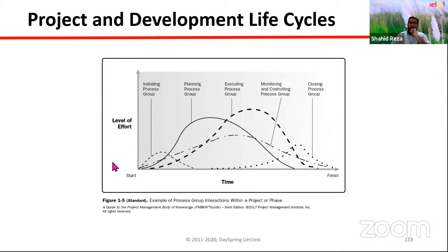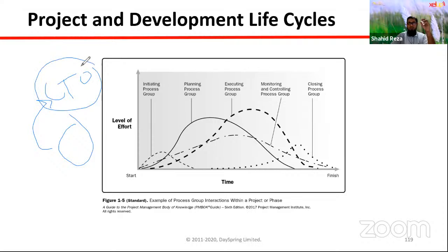So in a private sector organization, what happens? For example, the CTO at the top of the IT department. Any project running in the IT department, you will see everywhere the CTO is the sponsor. Why? Because all budget is allocated on the CTO's head. He is not giving money, but all budget is allocated against the CTO. That's why the project is happening under his department. In his department, he is the sponsor. Similarly, as Anis Bhai asked, the line ministry or the donor will be the sponsor for your project.